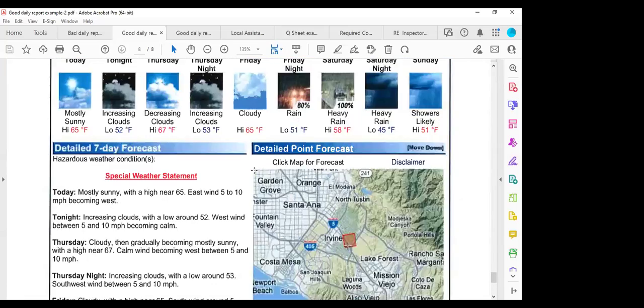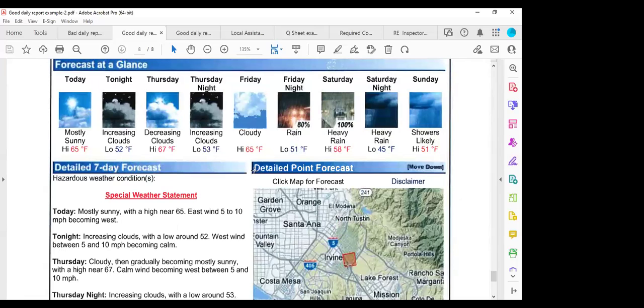So I consider this a good example of a diary, because having a good diary is really important. We have had several projects in construction where we had claims and we reviewed project files after years. One project was a 2-year project. After it was completed, we had claims. It took 2 years to close out all the books and major claims. So we had to go back and review. We had more than 10 inspectors on a job. Reviewing different diaries after a year or 2 years, you'll be surprised at how much information you have, and how much you would appreciate a complete diary. When you come back and review them after 2 years, you can still see what was happening in the project.